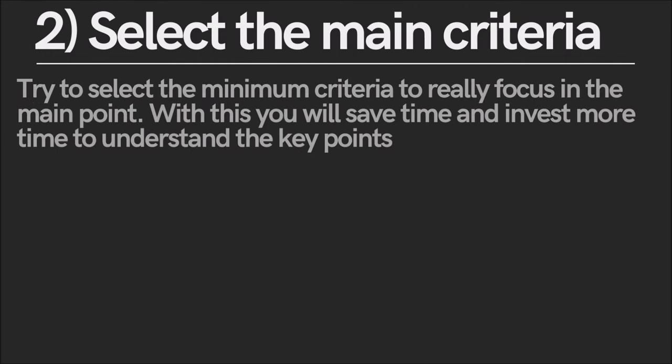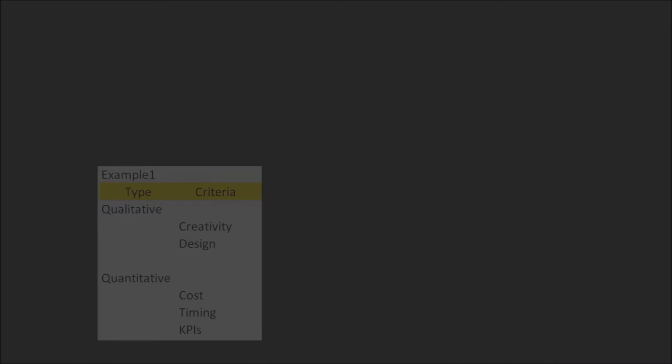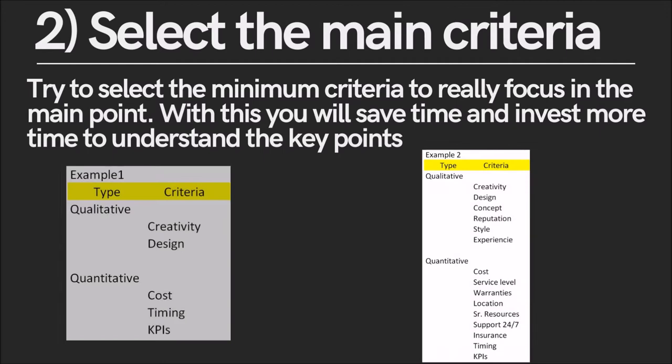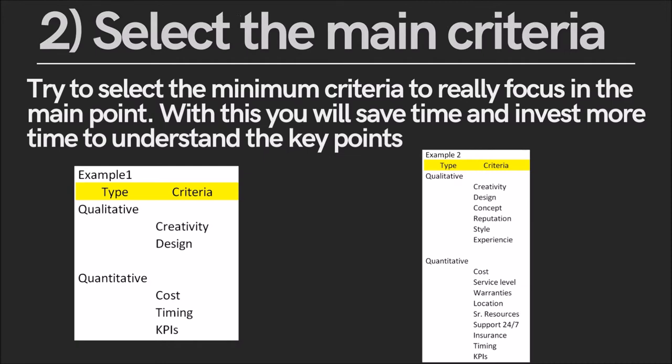Number two, define the main criteria. In order to evaluate the supplier proposals, arrange the criteria by importance and focus on the top criteria. Usually three to five are the key factors to evaluate a proposal. If you select more than ten criteria, the complexity will increase and will take more time to measure. You need to find a balance between the number of criteria versus the time required to evaluate the proposals. Here you can see two examples: a matrix with five criteria and another with fifteen criteria.